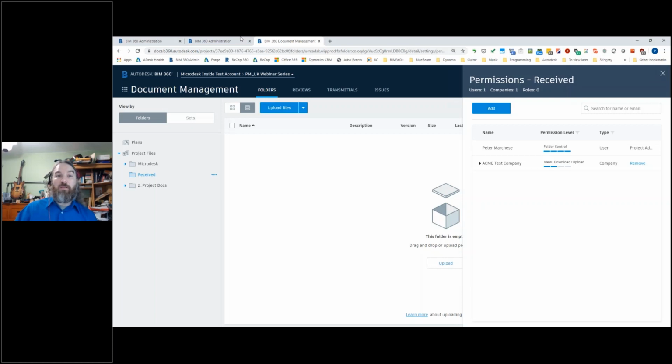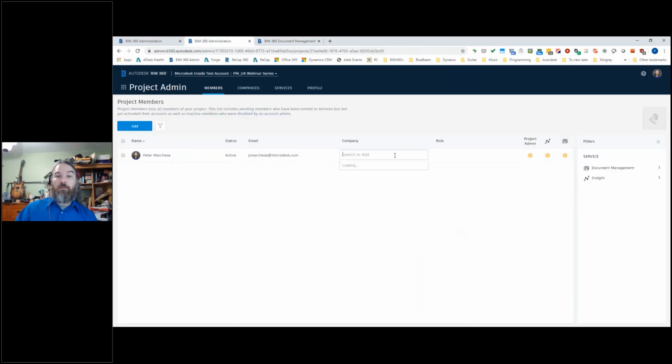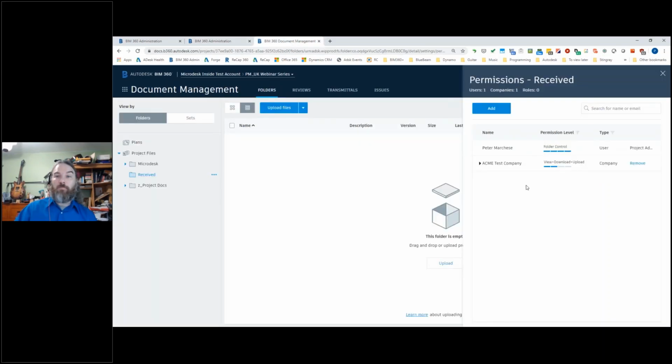Once I've done that, I can easily come back here and change my company name to the next company that I need to actually invite to my project. So if I want to invite Marchese Design into here, same thing. I would just keep on wash, rinse, repeat until I've set up all of the company permissions. Now, I can't do any individual or user-based permissions until those people are in the project. But role-based permissions, I can set up before I've done anything. Company-based permissions, I need the company in the project.